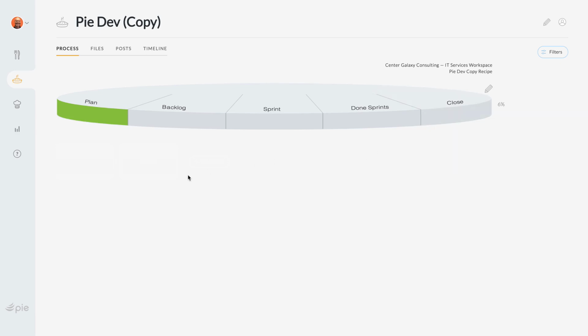So in summary, you've got sort of a sandwich view where the first part and the last part of the project are waterfall driven with specific best practices, process steps, using dependencies on their predecessors. And then you've got more of a fluid, dynamic, managing your sprints and your scrums with this agile process where you can deal with change very quickly inside the middle of the engagement here. So there you have a hybrid example, and I hope this was helpful.